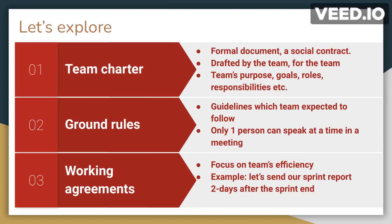It should be drafted by the team for the team. What does it contain? It usually contains things like the purpose, goal, roles, and responsibilities of the team members within the team. It outlines all those things at a very high level. In some team charters, I have also seen important milestones that the project has to meet mentioned as well.